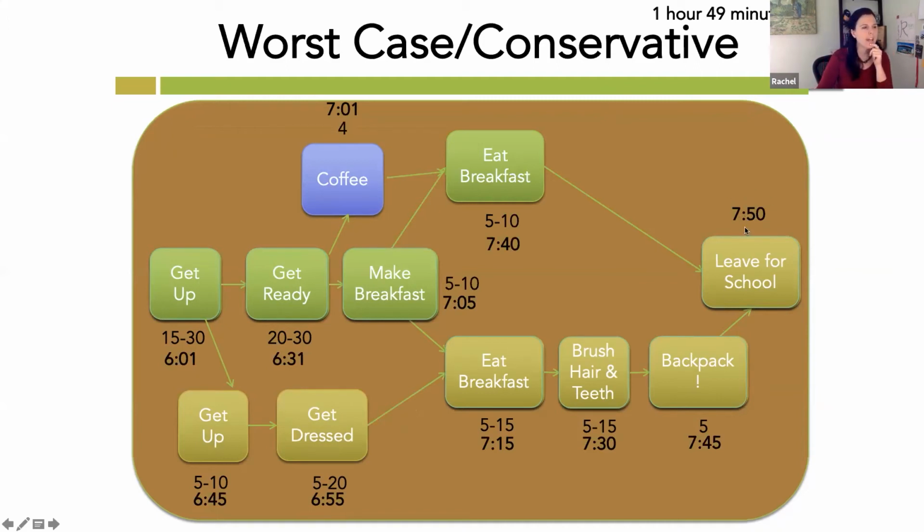So if we back that off, if we go down here and we say, okay, 7:50 minus 5 minutes is 7:45. We take 7:45, we minus 15 minutes, that's 7:30. We take 7:30, we minus 15 minutes, that's 7:15. Follow me? I'm going to assume yes. If you don't know, let me know, if you're not getting where I'm getting the numbers.